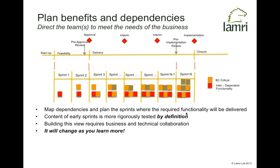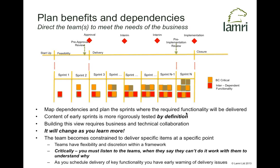We can provide focus to our sprints. Very early in the project lifecycle, we can focus on what's the scope of what we're building, what are the key non-functional requirements — performance, security, usability — and get contracts with third parties sorted out, maybe doing technical prototypes to prove key technologies. If we've got key functionality scheduled and it's not happening, that's a great early warning sign. Maybe we just need to replan because we've critically underestimated our velocity for all sorts of reasons — the beauty of the agile approach is it gives us early warning about these things.